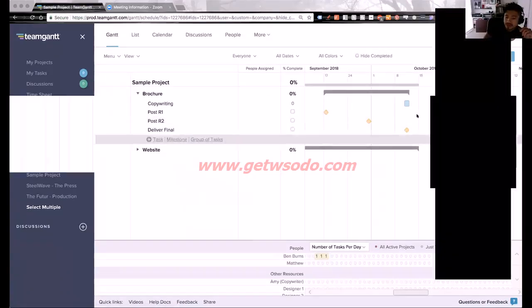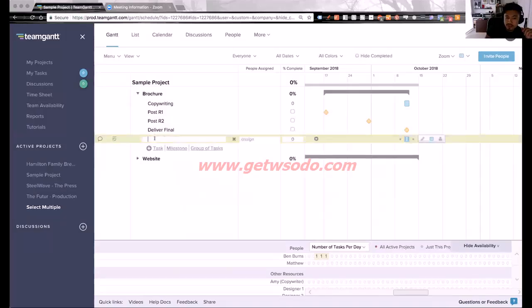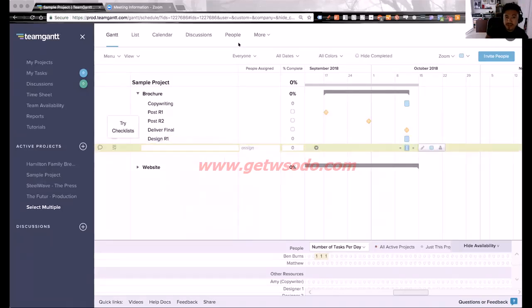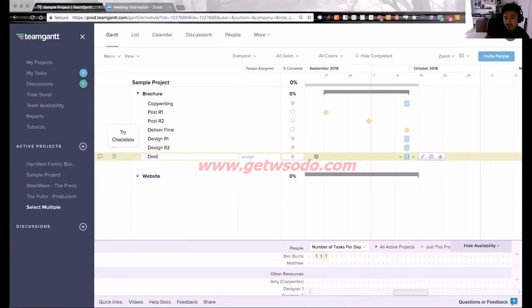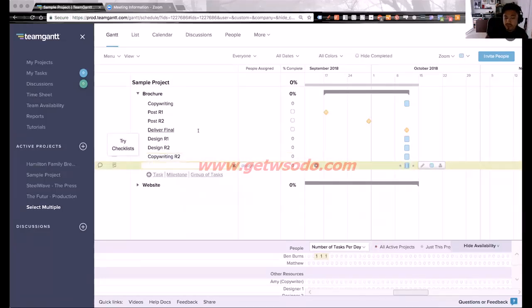So as you're doing that, just to give a little bit of visibility for everyone, usually with a lot of the projects, a lot of the things that we do, we space things out in 1 week iterations. We just find that we can stack multiple tasks. Usually, if we have one designer, they can probably work on two projects, jumping back and forth during the week. So we space out our posting in 1 week iterations whenever we can.